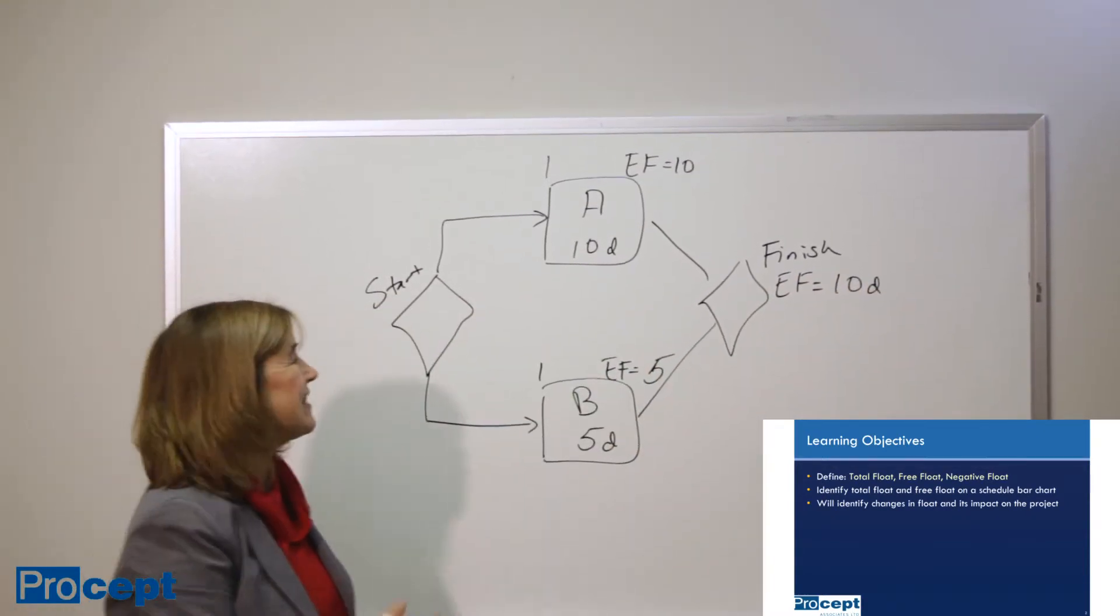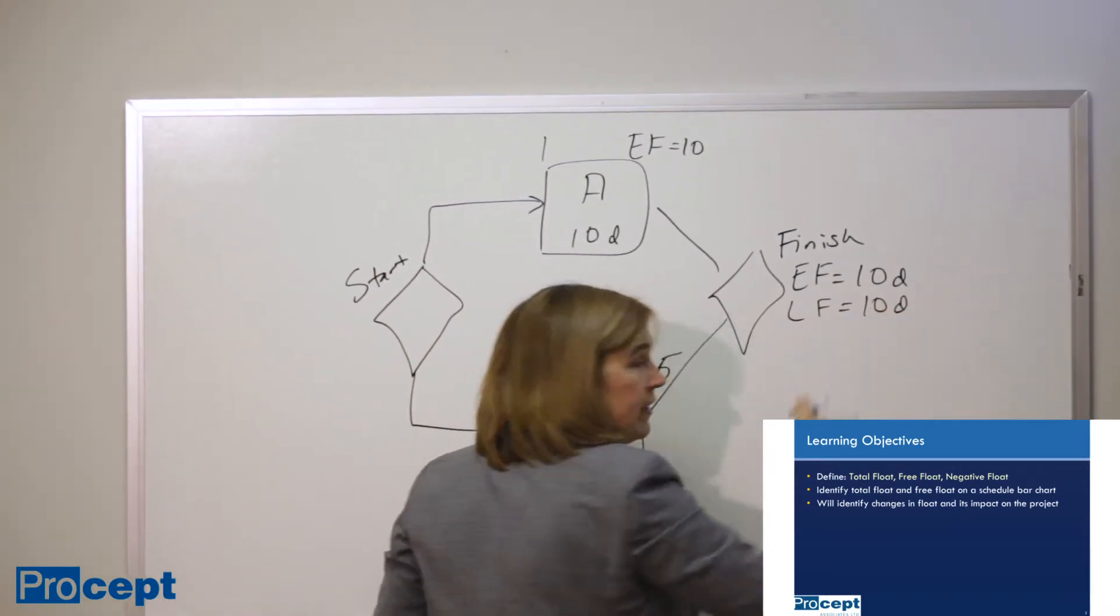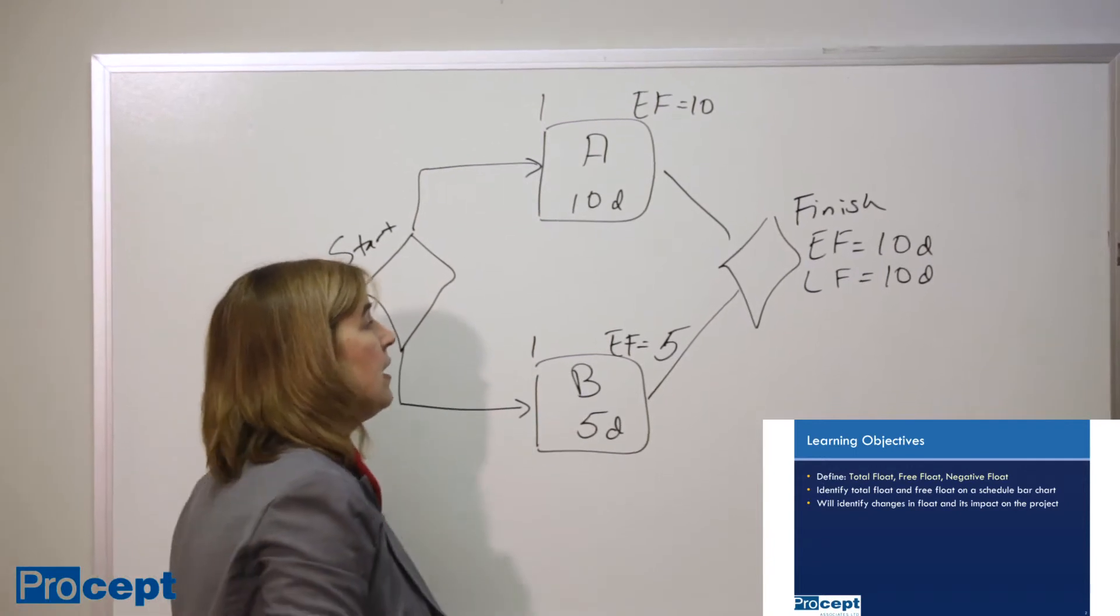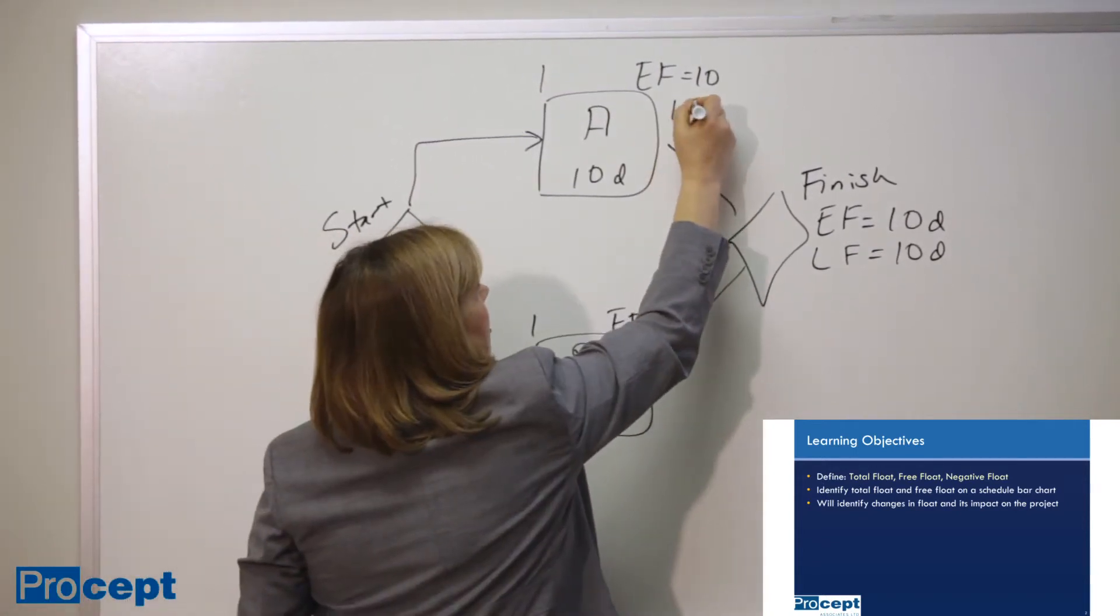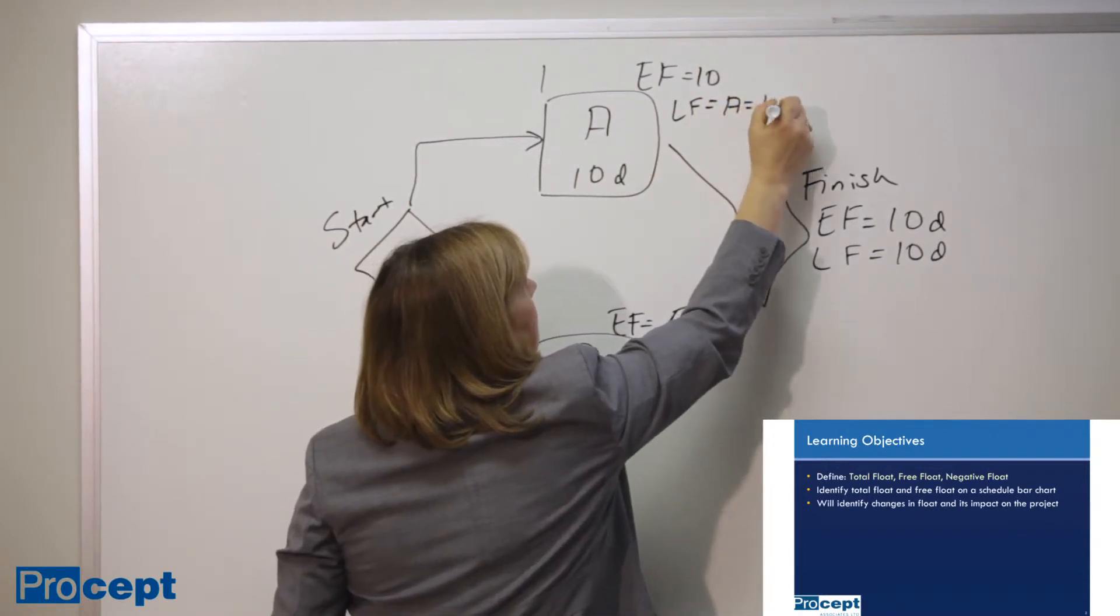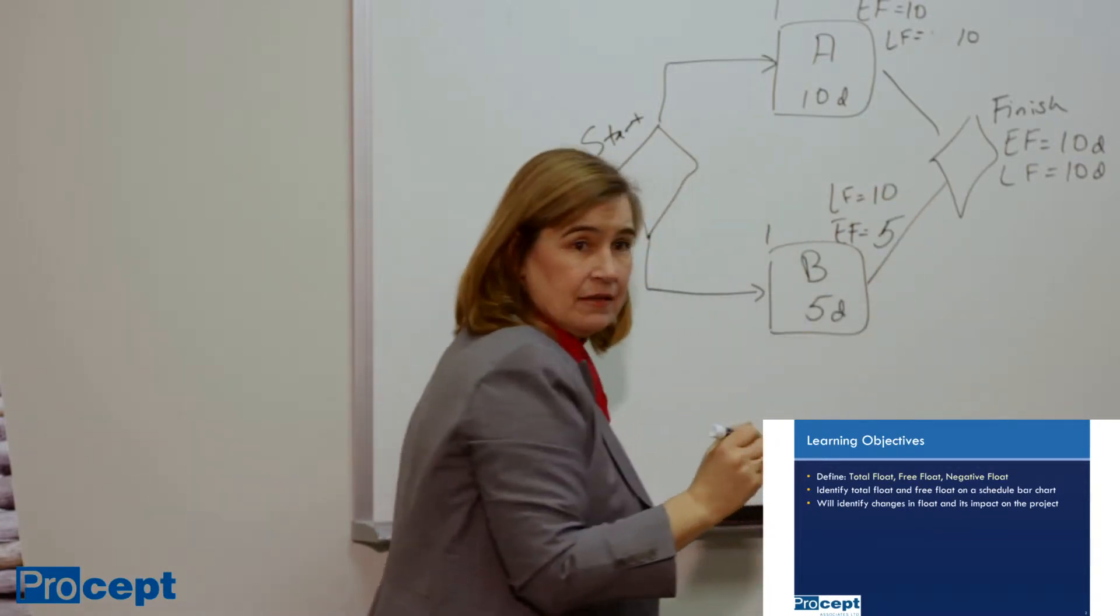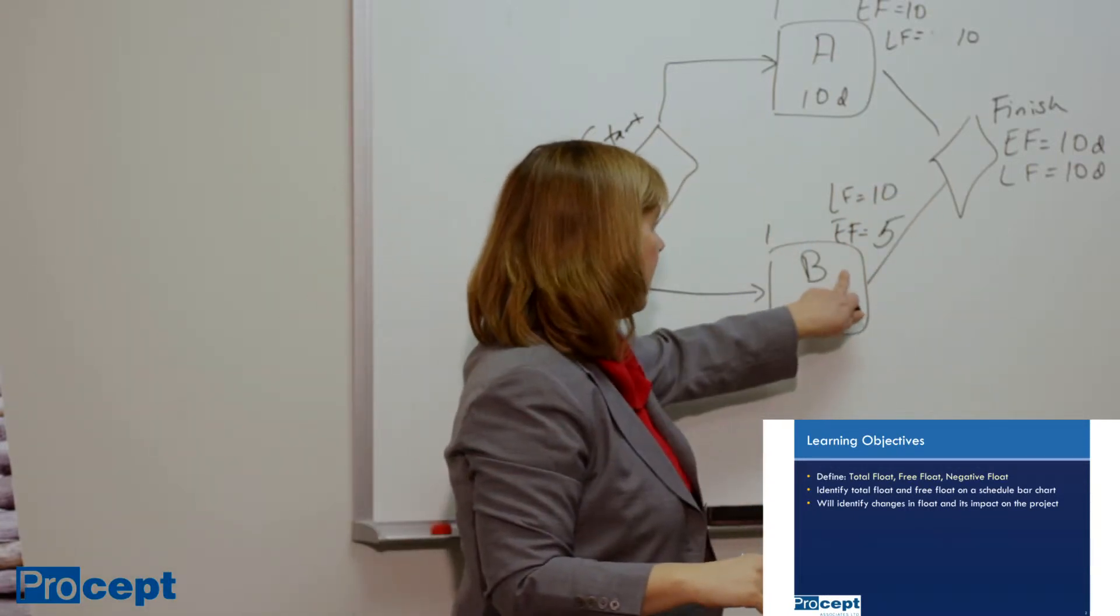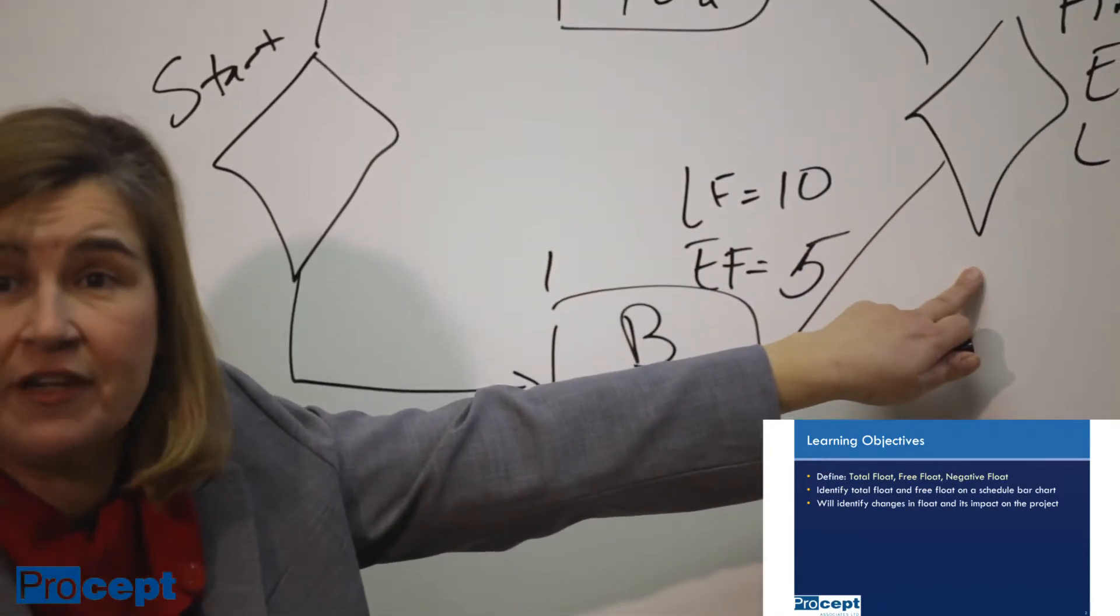Now if we work backwards, the latest possible finish time for this project is also equal to day 10 because we don't want it to slip past our promised delivery date. As a result, the latest possible finish time for A is going to be 10, and the latest possible finish time for B is also going to be 10. In other words, we can slip B by up to 5 days without affecting the project finish date.